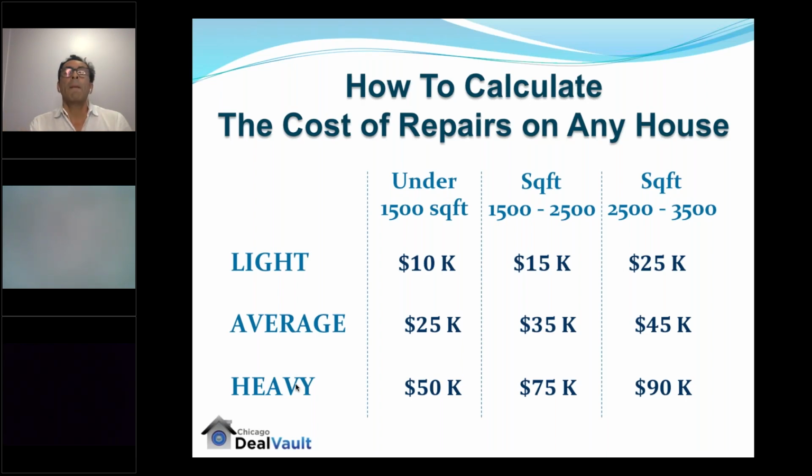That's when you're going to maximize your return. Not only that, but the amount of time the rehab is going to take you, if you stay within 40,000, is going to be between 6 to 8 weeks, having 2 to 3 people working on the project. You cannot have one person doing the entire project. Impossible. You have to be working with at least 2 to 3 people to get this done within 6 to 8 weeks. So that is a sweet spot.